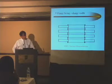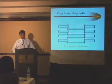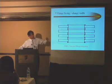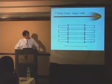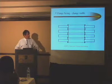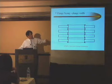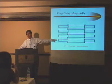Pick those up, turn them over, which doesn't sound like much, but this thing might be 60 feet long now, and it's got about as much stiffness as a piece of wet spaghetti. So it's probably going to take 2 guys and 2 cranes to pick it up and rotate it and put it down, times 4. You may actually spend a man-hour picking up and turning over these 4 pieces.